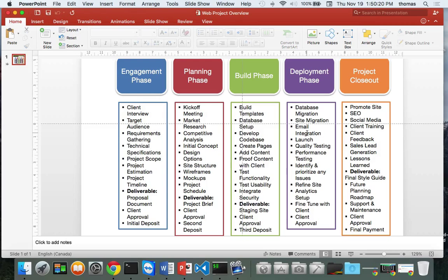But you've got to fill out this paper. It's a change management request form. You're going to approve that my project schedule is going to change, that I'm going to add in another $1,000 worth of costs for your little project that you want me to do, right? And my deadline is going to shift because now I have to add all these requirements up front, right? The reason why we do that is because we don't do things for free.